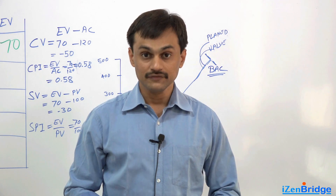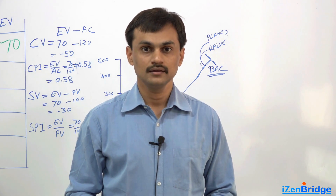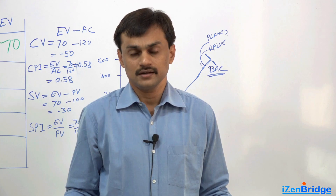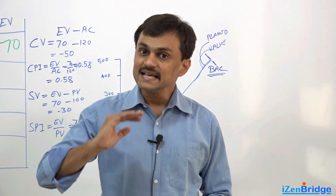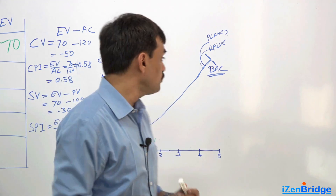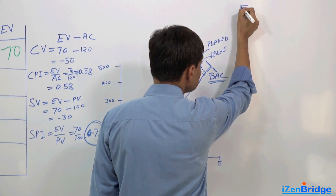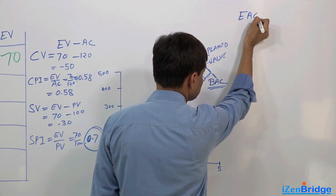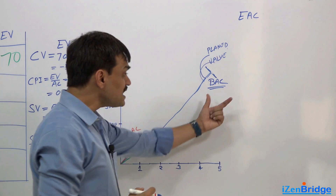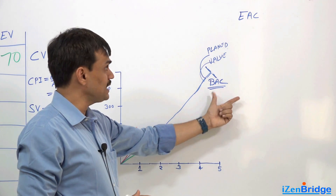But after knowing the reality, we need to tell what the budget at completion is going to be now, and this is called estimate at completion. So we are figuring out what our estimate at completion is now. Budget at completion was the original baseline — the original cost baseline. Estimate at completion is based on today.